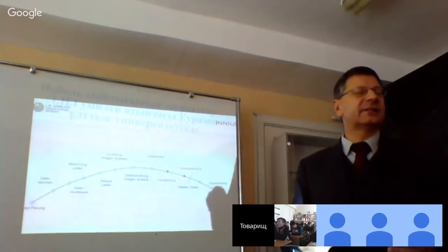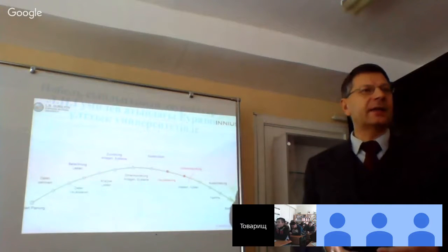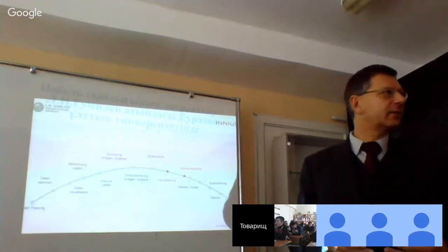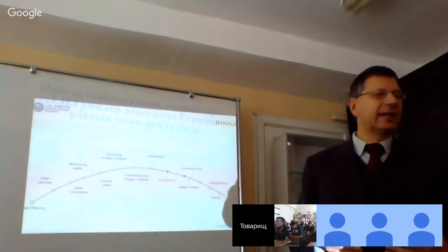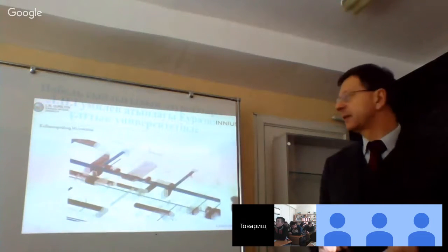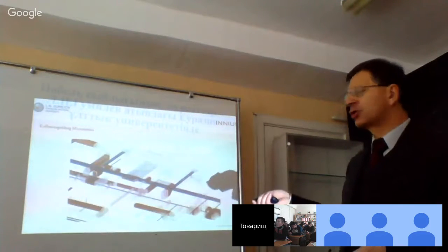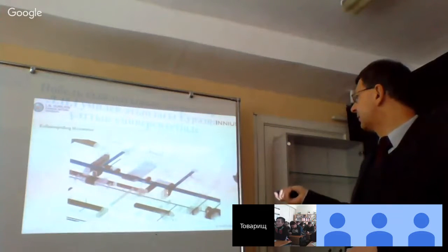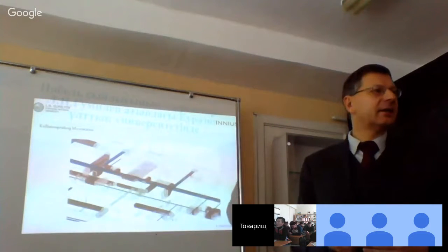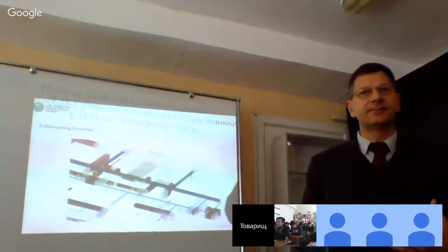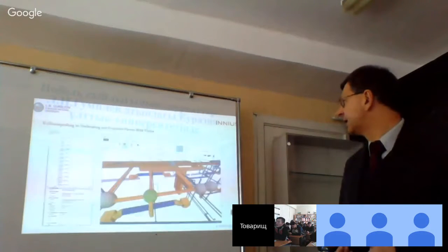If the systems are designed, a very important point is to check the clashes. Clash detection is included in different programs, but you get the information like shown in this picture. You get only the information: there is a clash between electro elements and air ducts. You have no information how many clashes you have, and you have no possibility to control what you have done.